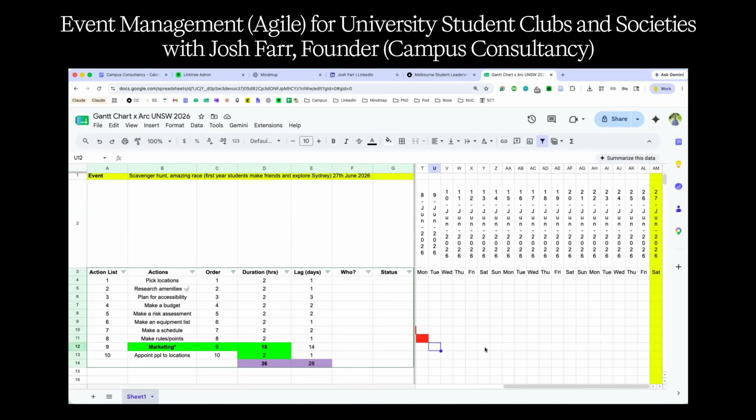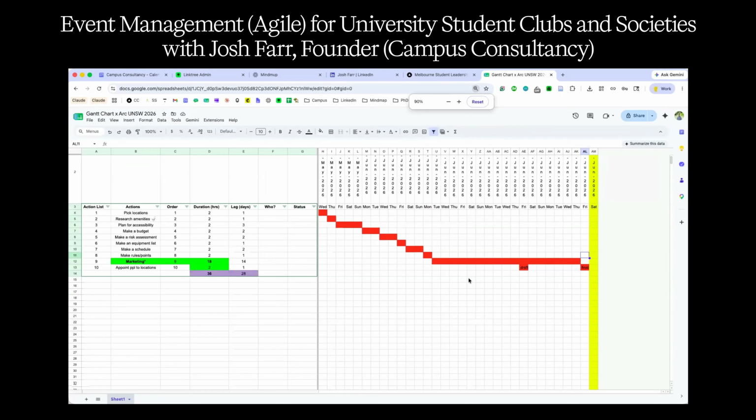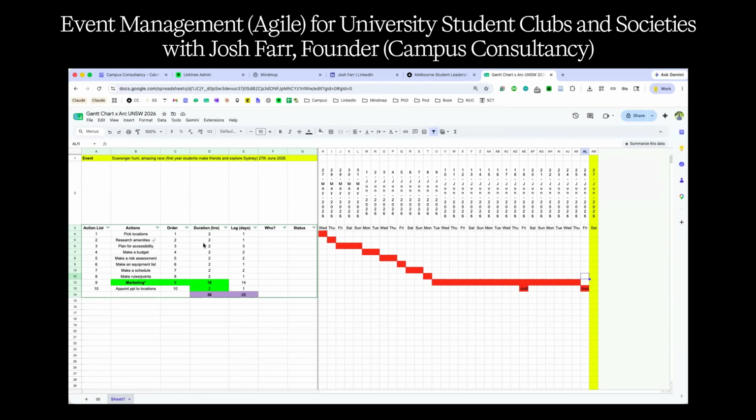Why that's important is you've then got all of this time to do your marketing, which is actually more days than we accounted for here. So that's Tuesday to Tuesday with a couple of bonus days, right? Now, after your 14 days, you might jump in and go, all right, on the last day, we actually don't want to do any marketing. Let's make sure we know who's going where. Good to appoint people. Maybe you do a draft appointment of people the Friday before. So that could be a draft. This could be final. Maybe that's because you want to make sure no one's sick the day before, etc. But what you now have is what's typically referred to as a Gantt chart of exactly what needs to happen to pull this event off in a month.